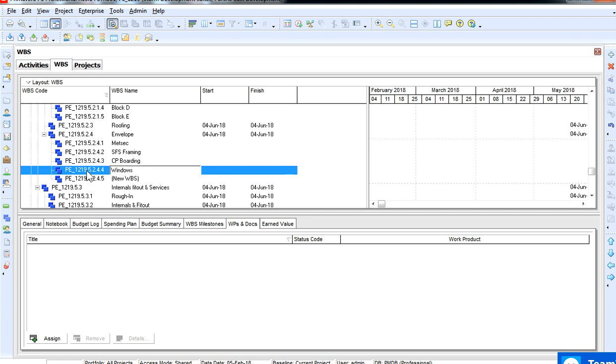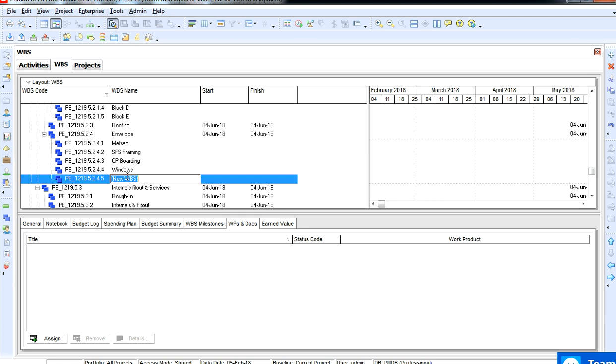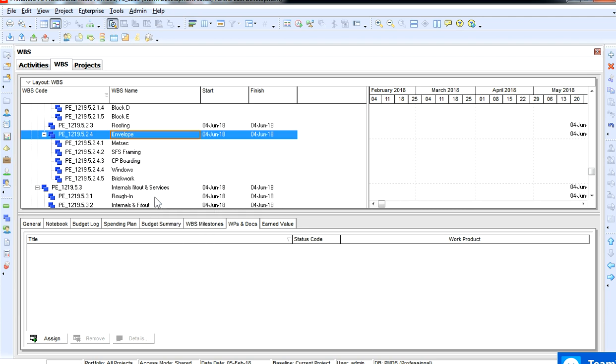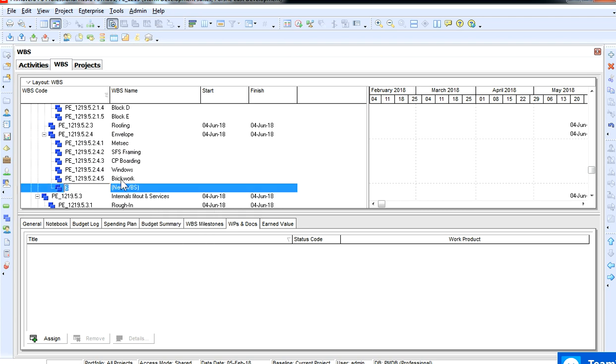After the windows are hung, we know the building's more or less watertight. Straight after that, we do the brickwork, and after brickwork, we do the rain screen cladding. The reason you do the brickwork after the windows, as opposed to before, is that if you put the brickwork up and then hang the windows, you'd have an ingress, because you're supposed to make the building watertight.